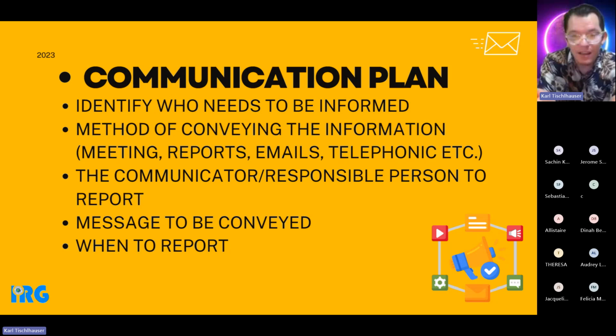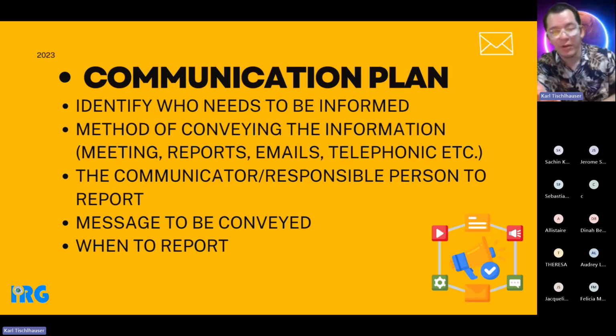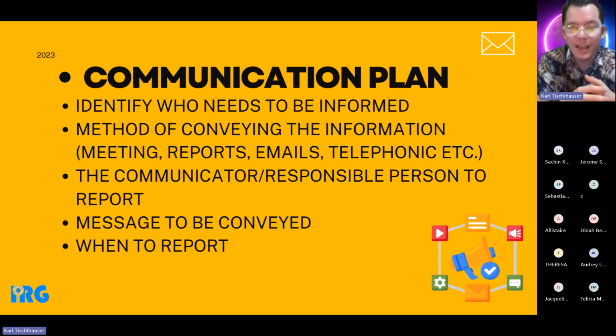So yeah, that's why I said it's different projects, and that's why I'm telling you this, is because projects move at different paces. They develop different momentums, and that will be very informative to how you communicate. If you're communicating daily, if it's that intense, then you're going to want to have a communication plan in place. If it's monthly or quarterly, then it's not necessary. Then it's just something you're going to mention in your big project plan, but you're not going to have a communication plan set in place. It's not going to be completely necessary then.